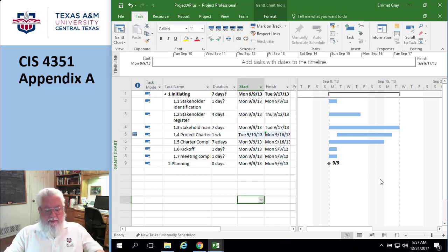Okay. The next thing to talk about is entering some data. So table A29 on page 34, we're supposed to enter the task duration. I'm going to do a few of these, not many. Notice that right off the bat they skip over the durations for the task summaries because those durations are calculated automatically, right?